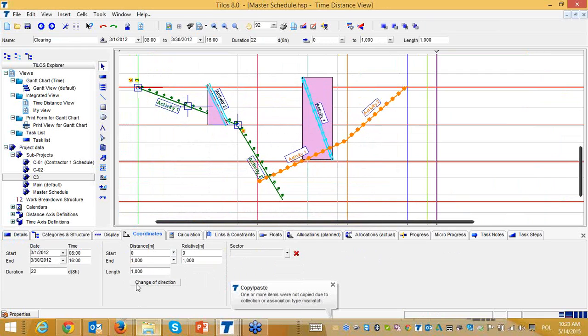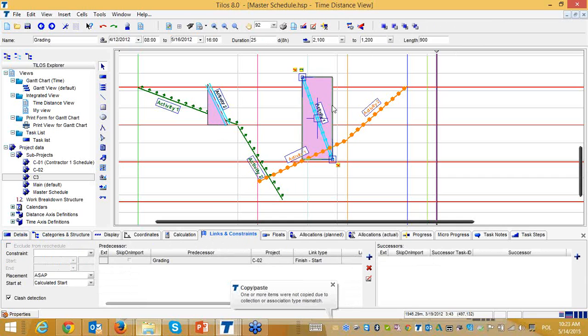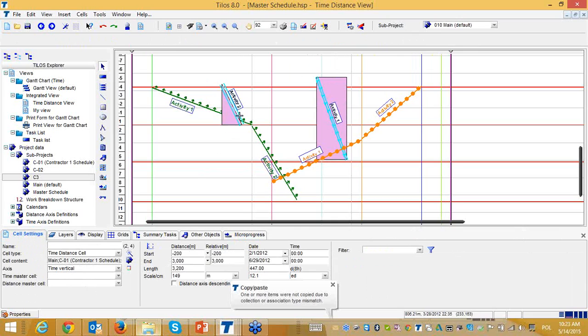The second thing I should check is if I have here this clash detection. So I should select the activities and I should say to run the clashes. So here I have already selected. So of course it is a very simple project, so you can easily see yourself the clashes, but when we are speaking about thousands of activities, it will be not that easy. It will be really challenging to see the clashes. So here we have detect task clashes. I run this.